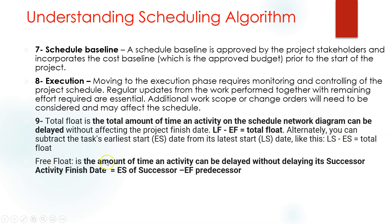Free float is the amount of time an activity can be delayed without delaying its successor — meaning the early start of the successor minus the early finish of the predecessor. Total float affects the overall project completion, while free float affects the following activity.